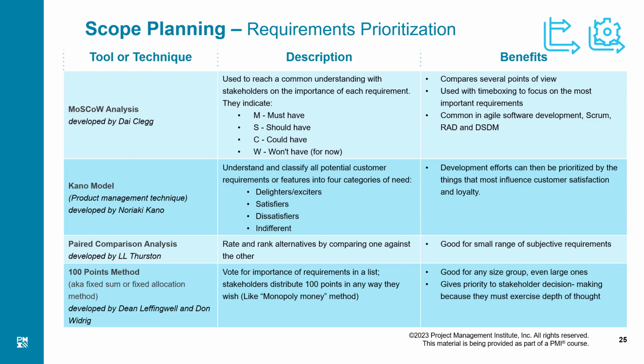Now, we are not calling it Moscow or Kano. We are just saying that this one is more important than this one. Whichever is more important goes up the stack, and the other one goes second. Then we pick the third card out of the stack and compare it with the top one. Whichever is more important goes on top, the other goes down. For example, if the third requirement is more important, it goes on top, and 1 and 2 go down. Similarly, if we keep doing this with all 1000 requirements, ultimately we will end up with a stack of prioritized requirements.